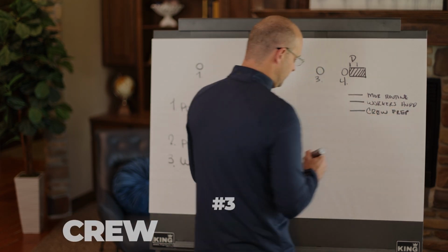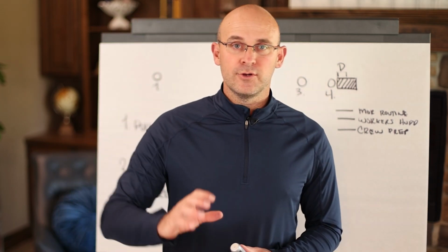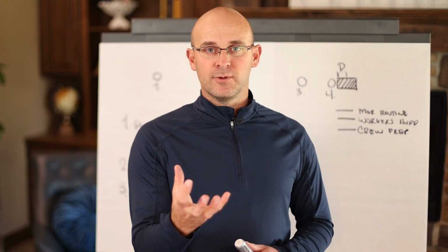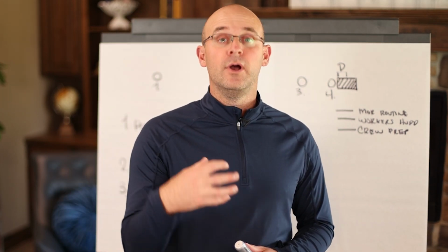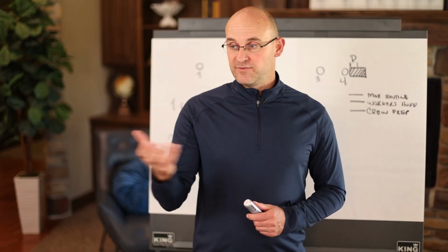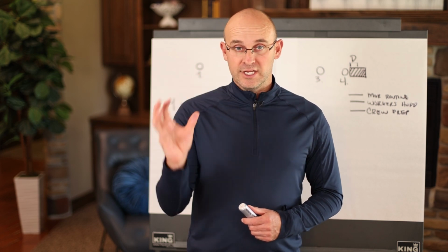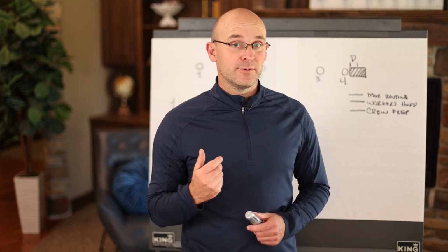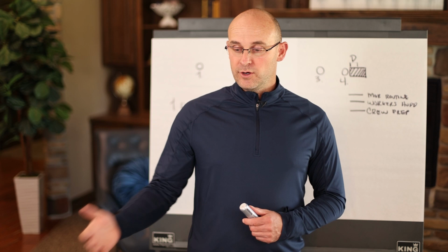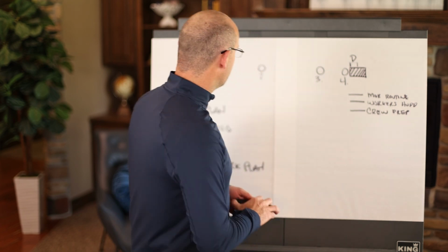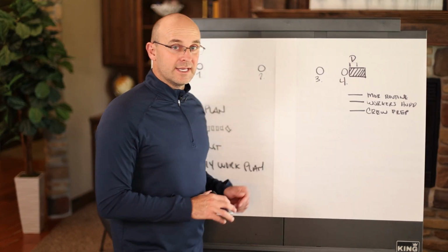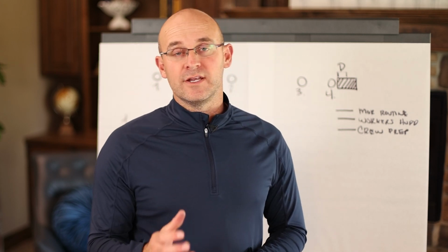And the crew preparation huddle, that's where you gather with the crew. You specifically do a job briefing for the task that you're going to do with your crew. You'll probably 5S your area, shake out your materials and tools. You will get your pre-task plans, your safety pre-task plans ready to go. You'll pull out your quality checklist that we created back here, and you will get the work ready for that day.